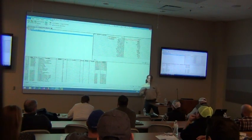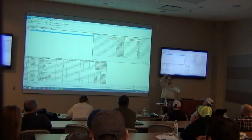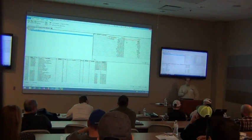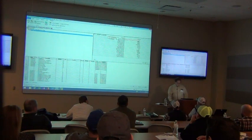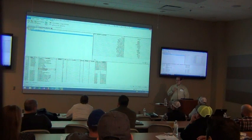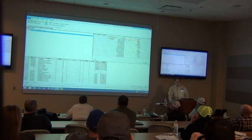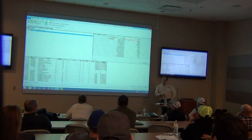The key to assemblies is the questions at the top that help calculate quantities for you. A lot of estimating systems allow you to select from multiple options — maybe I don't want just one price for concrete; maybe there are multiple strengths, multiple additives, or maybe I need a concrete pump on this job but not that one. This list of questions is almost like a checklist to make sure I'm covering the bases in what I'm generating.